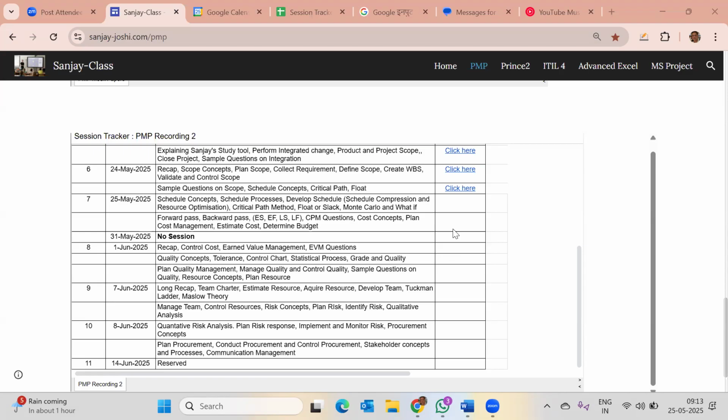Second option, in most situations, they will give: extend the sprint. That option is also wrong. Definitely wrong. This method is called the time box method. So changing the sprint length on the fly just based on the actual progress is not allowed. Correct. And particularly, Kuldeep, these days it's not only scrum, it is scrum of scrums. Multiple teams are going ahead and doing it there. So if your team postpones it, the whole cycle, the whole rhythm will collapse. So you cannot extend the sprint. That is not the right option.